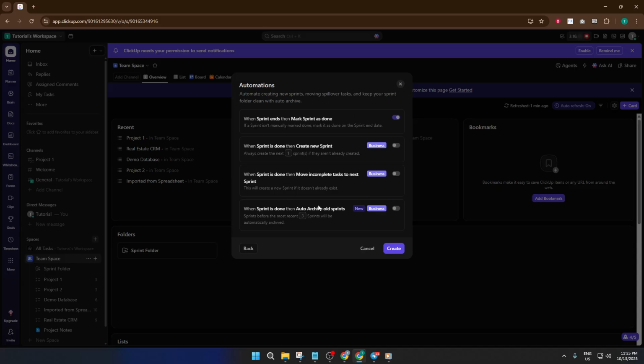Now, when a sprint wraps up, there are a few best practices built into ClickUp to help you manage that end-of-sprint moment. First, mark the sprint as done. This is your way of communicating to the team, we're done with this round, let's reflect and move forward. If you have unfinished tasks, this is normal and totally okay. Select the option to move incomplete tasks to the next sprint. It's a smooth way to keep momentum without letting things slip through the cracks. You should also create a new sprint right away. This keeps your cadence steady and makes it easier for everyone to know exactly when the next work chunk begins.